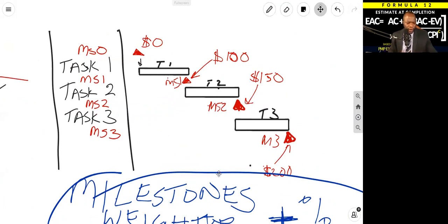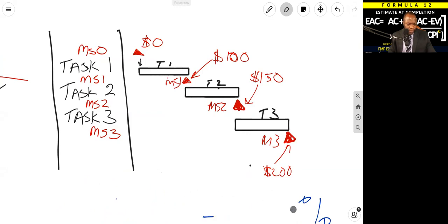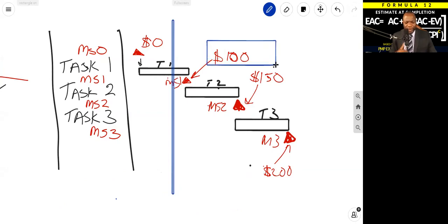So let's assume we are at time now. Let's say time now is here. If this is time now, you can see this milestone is weighed at $100, but the percent complete of the work right here is 60. 60 percent complete for task one, associated with milestone one.